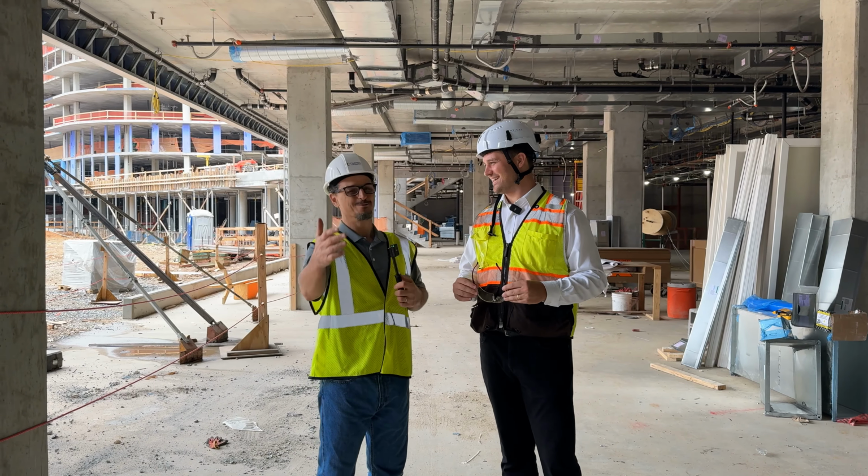Great. So you guys are the mechanical contractor. Yep, mechanical and plumbing. And for those who aren't familiar with the construction industry, may just be getting into the business, what is design build all about? Okay, so design build is basically where the mechanical contractor hires the engineer directly in lieu of an architect or an owner hiring the engineer. So we're able to manage the engineer as a subcontractor. We get to work with vendors more closely, like Hobbs.